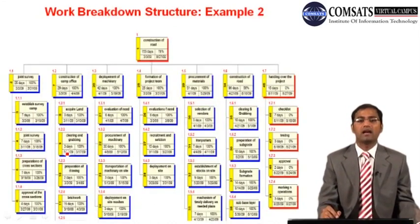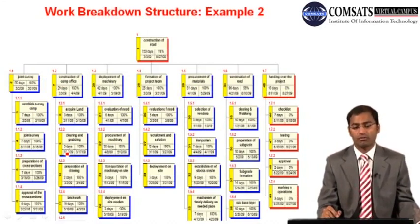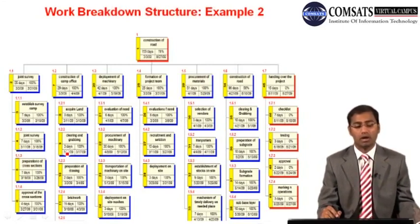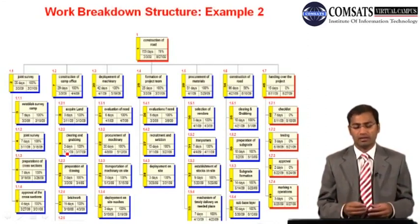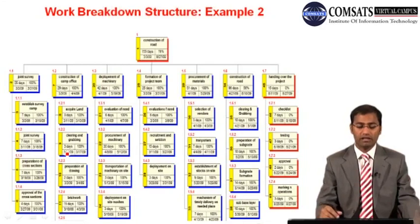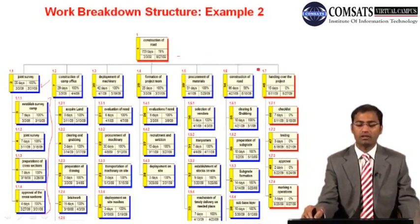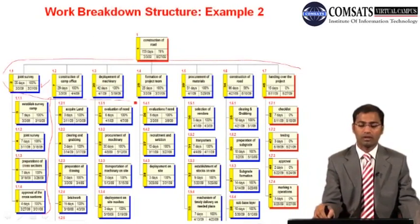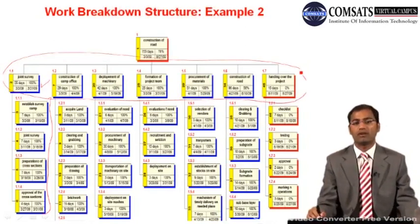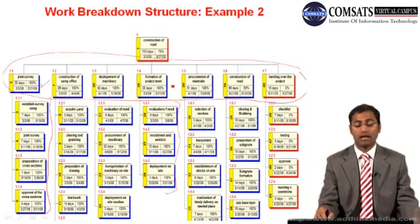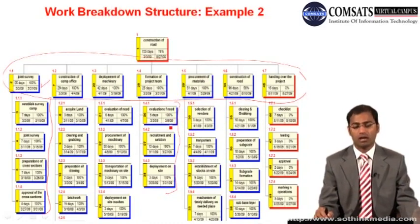There is another example about construction of roads with seven work packages. Through this discussion we concluded: as far as cost is concerned, we can sum up the cost of work packages to reach the cost of a control account, and sum control account costs to reach the project cost. But as far as time is concerned, this approach is not correct — we cannot simply sum durations to get overall project time, due to parallel activities and other constraints.